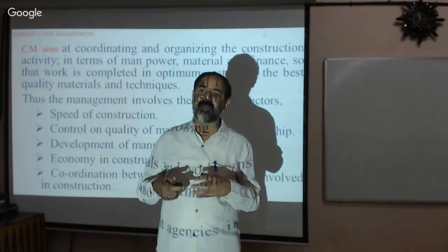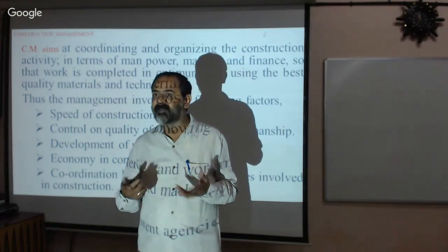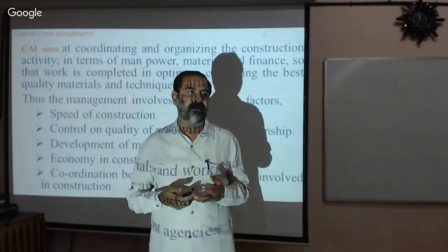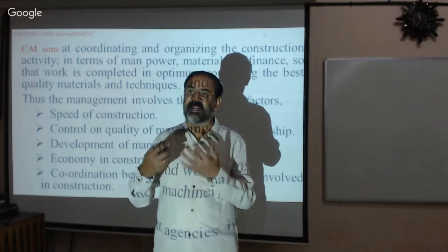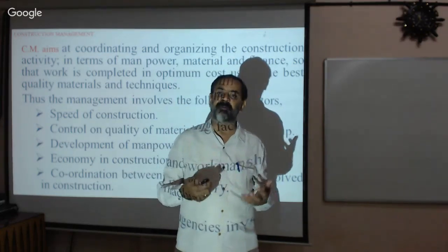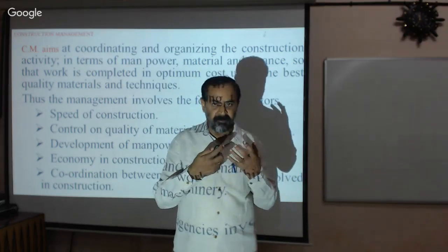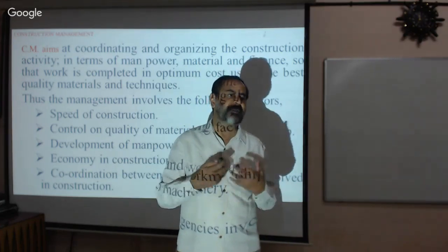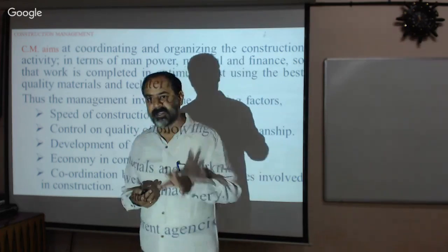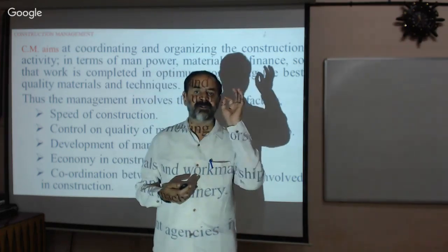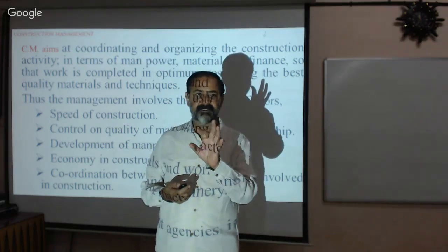For example, if you are preparing only 5 cubic meters of concrete, will you order ready mix concrete? No, because it is a very costly affair; outside we prepare and pour it. But if you are preparing 100 cubic meters, it is not worth preparing at site. Don't collect the material, because it takes too much time and too much space, and material is wasted. But be careful while ordering the concrete. According to the requirement, the design, and the necessity, the structural designer will specify it.